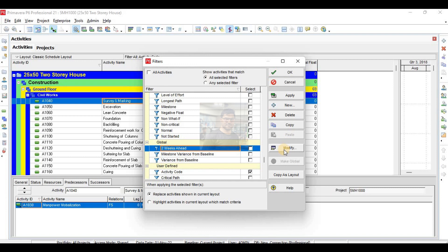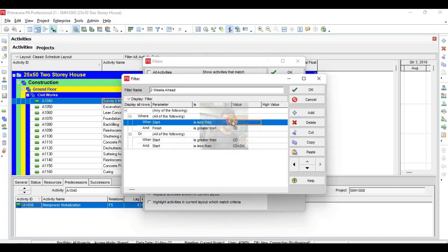I hope you understand what I said. So this is my two-week look-ahead — there will be two conditions. The first condition will include those activities which have started before today — less than today means it has started before today — and it has not yet finished today. The second condition: those activities which will start after today and before two weeks from today.